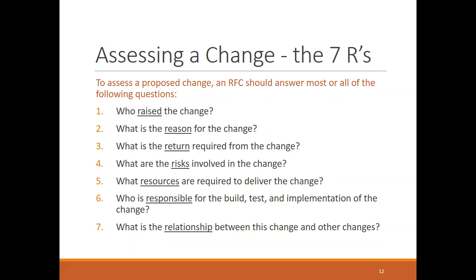The risks involved with the change, and that's part of the reason why we had to put this to the committee, because it could be that this change is going to upset some apple carts. So we have to analyze and find out the resources required in terms of computer equipment, but probably more importantly in terms of people. What people do we have to apply to this, and then who's going to take responsibility for it? It could be people in house, or we could be outsourcing this work to an outside group. And any other changes.